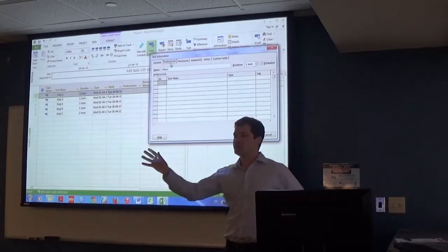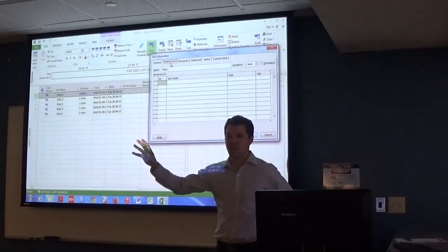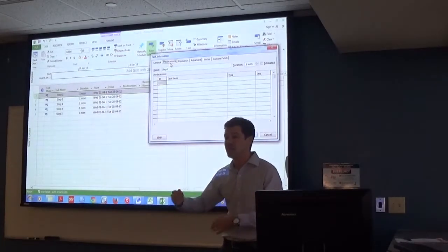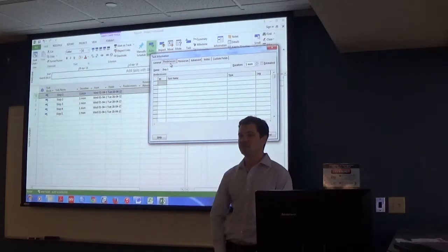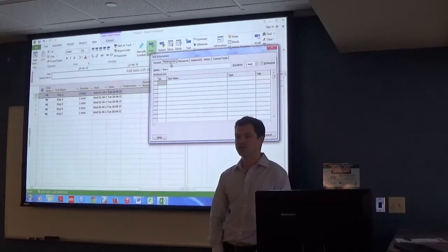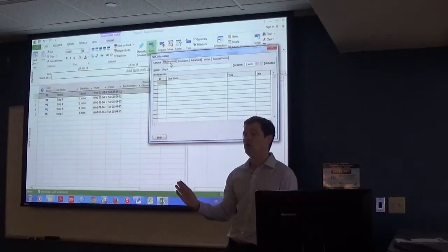If they don't happen in a specific time period, it could then become a critical task because you have to do that task before you do another one. So let's say like the drywall, for instance. You can't put your fixtures up until you have the drywall installed. So you can't put a light fixture on the wall before you have the drywall installed.